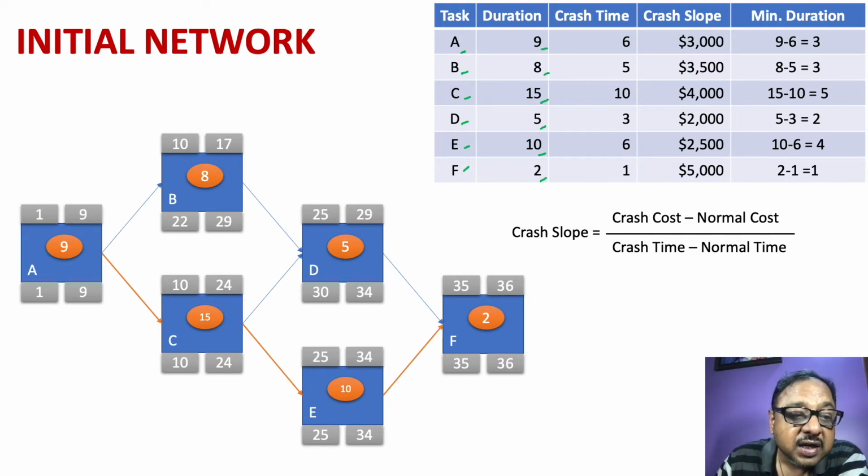Based on these durations and the network plan, I have plotted for you the early start, early finish, late start, late finish of all the activities. Now, you can also notice that after the computation of all that, I am able to find out the critical path, which passes by this particular route. So this is my critical path for this particular network.